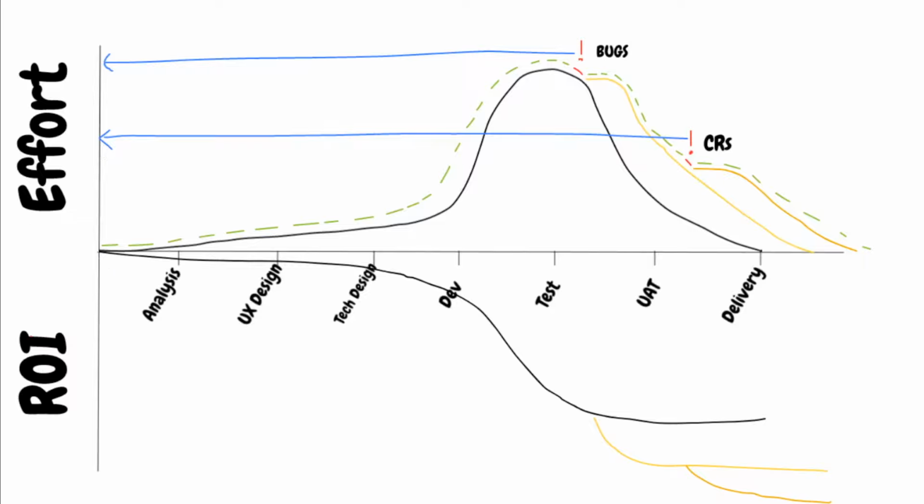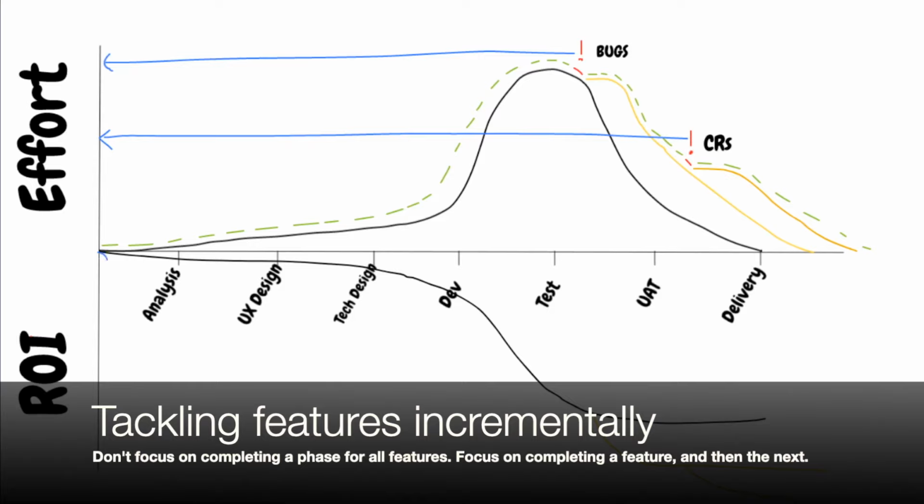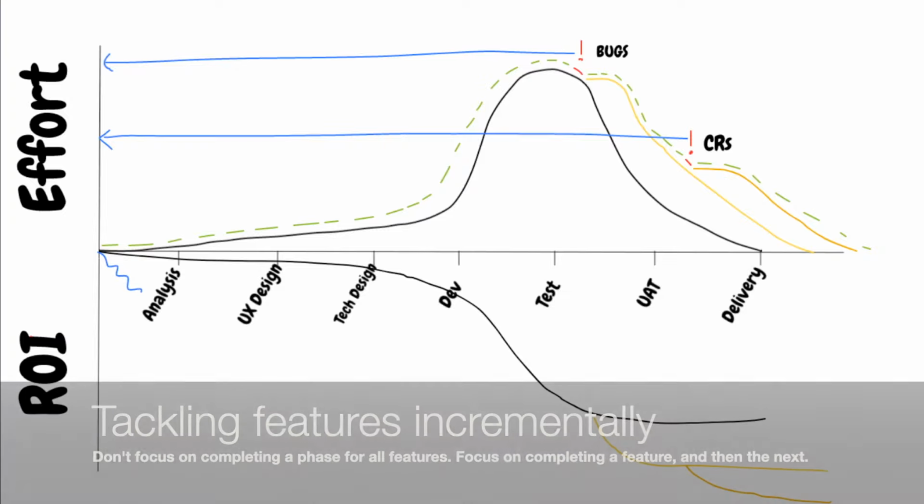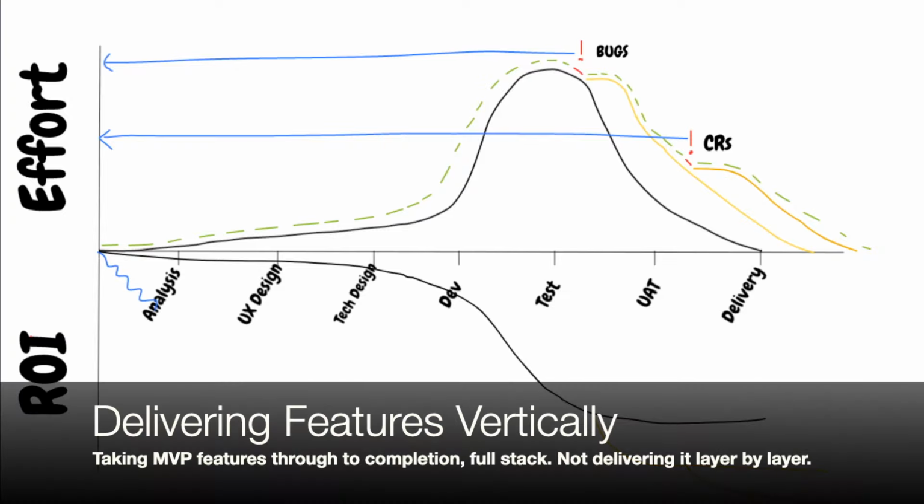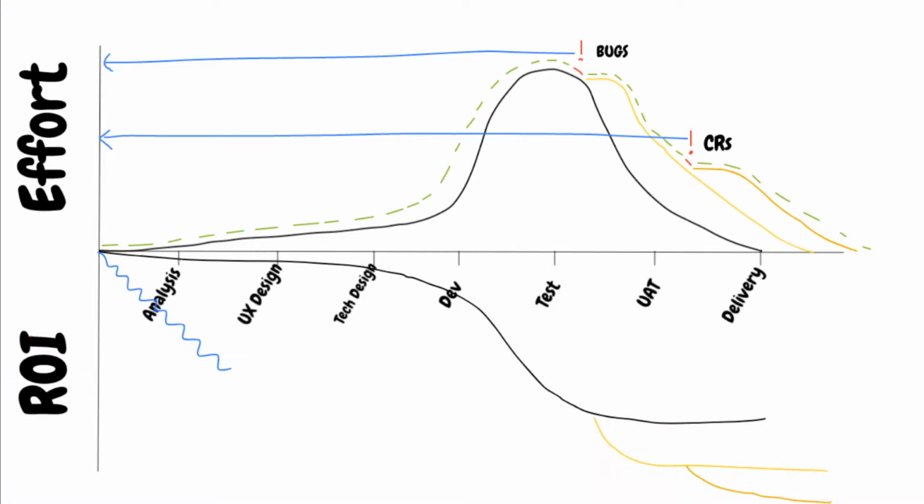We do that by delivering features in smaller increments. So what we're doing is we're taking small steps, delivering vertical end-to-end slices of functionality as we go, meaning that we're discovering and dealing with all the bugs related to that functionality along the way. And at the end of the increment, we're saying to the customers, here you go, what do you think? And we're getting that feedback to allow us to realign for our next step, our next increment.